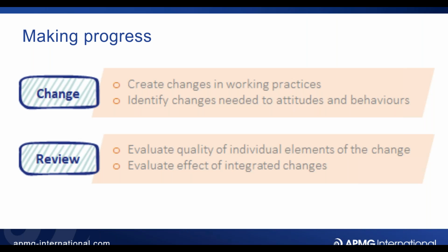And of course, for every single piece of work that we do, we want to go through this cycle of making sure that we do it and we test it. So there'll be a review. Some of it might be technically tested with test scripts, but sometimes there'll be a walkthrough of a new business process so that everybody understands how a job now works. There might be lots of post-it notes up on the wall of all the individual steps of a new process. So we'll make sure that they all hang together.